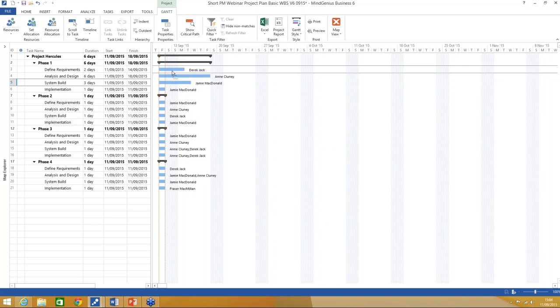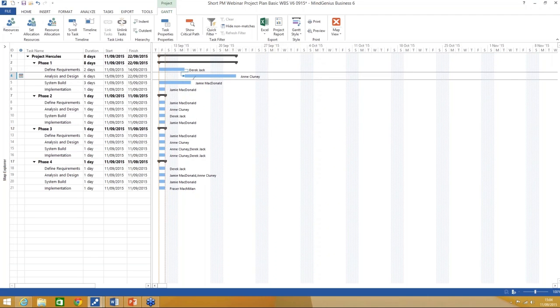We can also link tasks and show interdependencies very easily and quickly, so that our project stages or phases and the overall project schedule builds up and takes shape. Also worth mentioning at this point is that we can introduce constraints for each and every task, or as required, for things like start dates, finish no later than, must start on, must finish on, and so on and so forth.